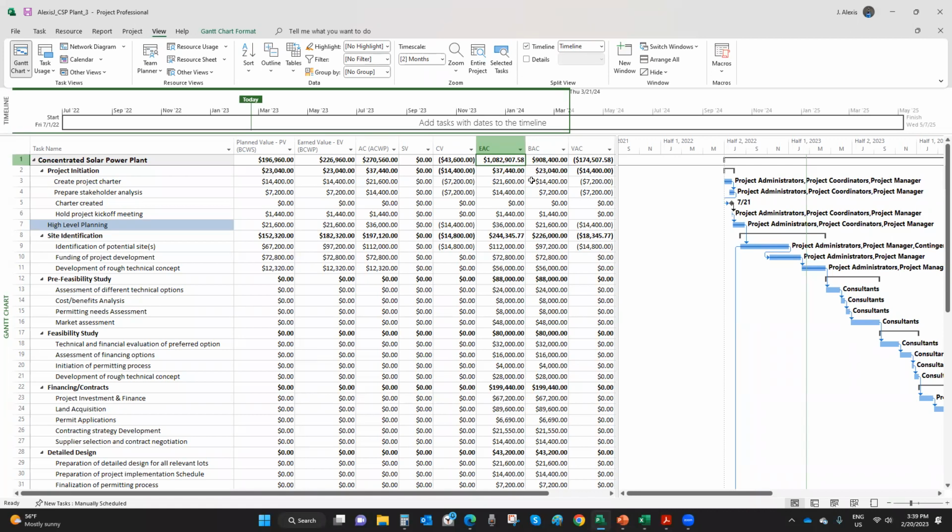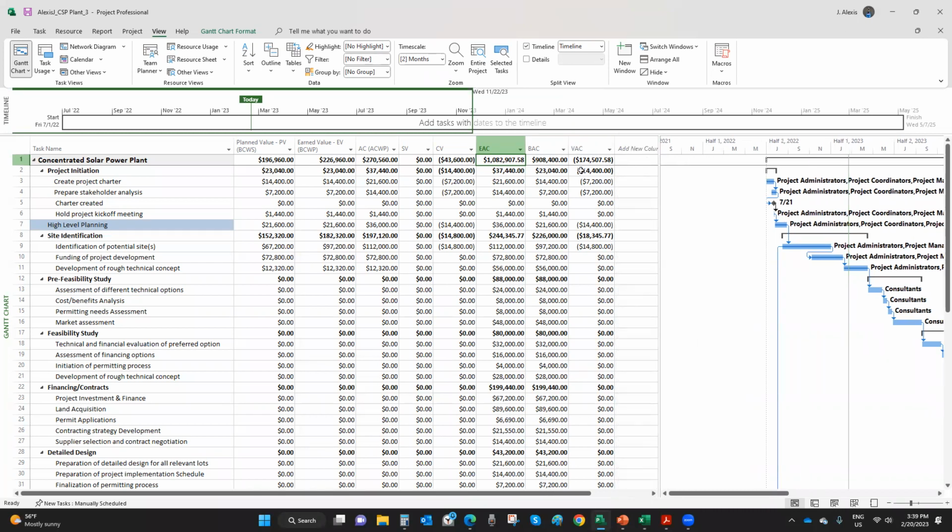If your productivity remains the same, you will have a budget deficit of $174,500. Now, remember, the project has just begun. You have time to pull your project back on track. So a project manager would know what the situation is.